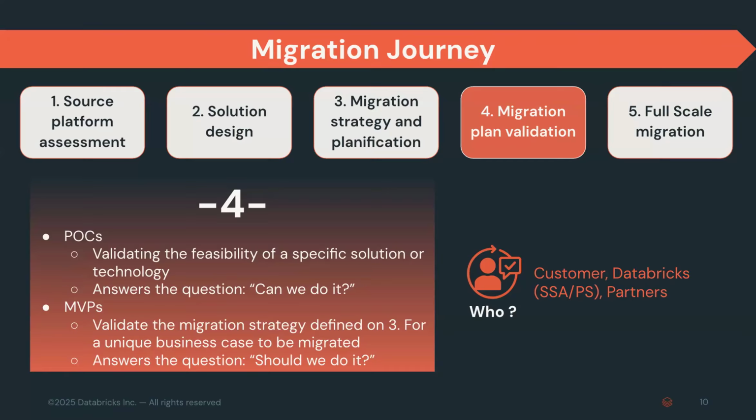And again, I envision there might be the question: 4 phases, wow, guys, when you do the development, are we talking here about 2, 3 years or 12 years of migration? Not at all. Believe it or not, the first 3 phases can literally be achieved within 2, 3 weeks, sometimes up to 4 weeks of engagement. And it's super important that we are aligned on the light of the approach and on the parties there. Migration plan validation could be from 2 to 6 weeks. So basically within the first 90 days, I would say, we typically approach all 4 phases, as a majority, providing that there is customer interest and providing that the pace at which we are moving is also shared with the partner and with the customer team.